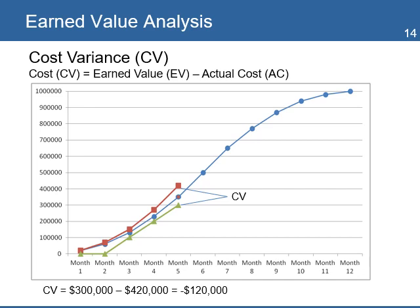You calculate cost variance to see if the project is spending funds as planned or not. Cost variance is the difference between Earned Value and the actual cost. For this example, the value of cost variance is minus $120,000. A negative result indicates a budget overrun — in other words, the project has spent more money than the value of the work delivered to date.